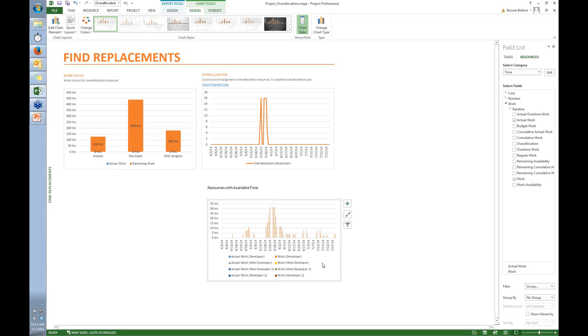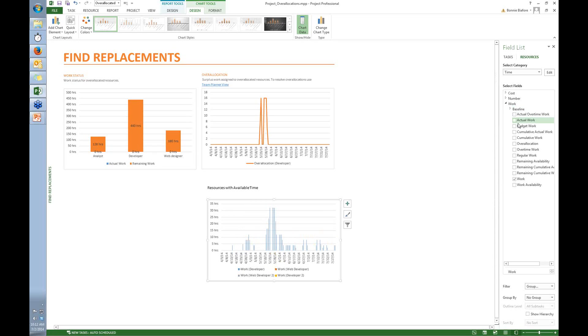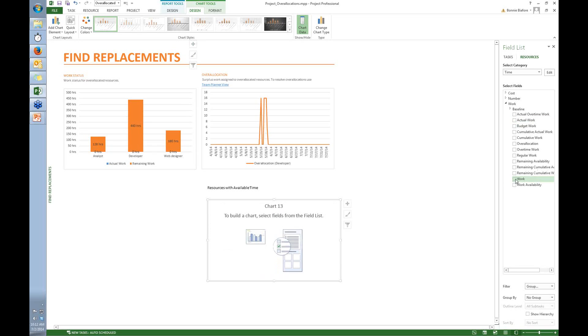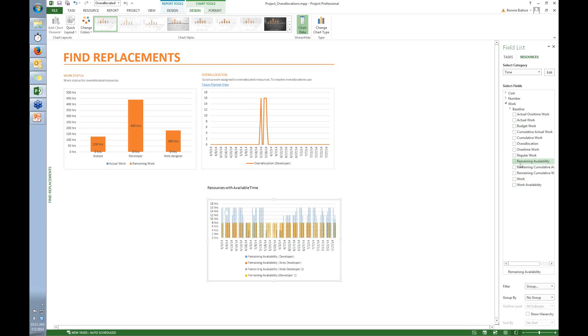Next thing is, what I want this chart to be is available time. I don't care about the actual work they did. So I come over here and I turn off the actual work check box. I don't even care about the work they're scheduled to do. Turn off that check box. What I care about is their remaining availability. So I turn on that check box.